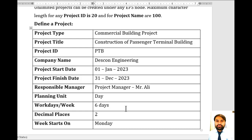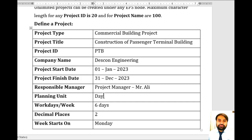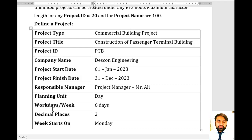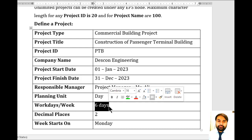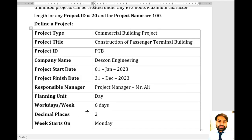The planning unit is 'day' — we will plan our project in days. You can also plan in weeks or hours, but here we select days. Work days per week should be six days a week. Decimal places is two, and the week will start on Monday.